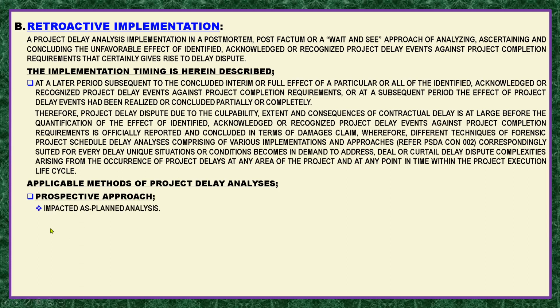One is the impacted as-planned analysis. That is a prospective approach, but in a retroactive implementation. It is the same as the time impact analysis, but now from a retroactive perspective. Just as I said a while ago, the time impact analysis is also in a proactive perspective.